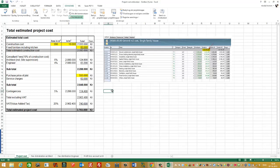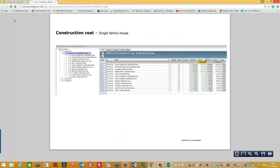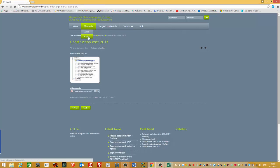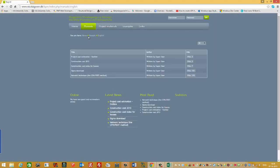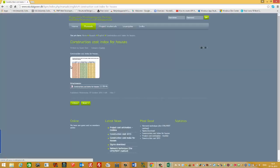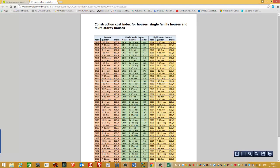To update the price, I need to find another file on the website. You need to find the file that says Construction Cost Indexes for Houses.